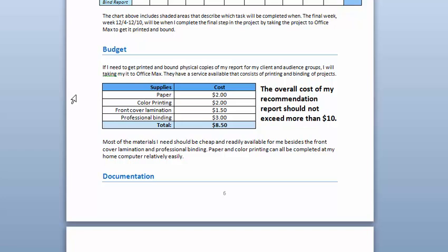Other than that, however, in the Gantt chart, try to remember that the purpose of a Gantt chart is to help show a more realistic work plan where the start and complete dates for tasks overlap, and do not proceed in a nice and tidy linear progression where one step completely ends and then you begin the next step. Work on it until you are completely finished with it, and then move on to the next, and so on. If your chart looks like a checkerboard staircase without any overlapping steps, you might want to go back and rethink how things might really happen.